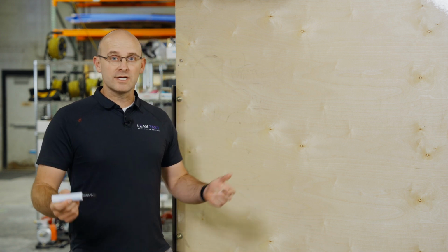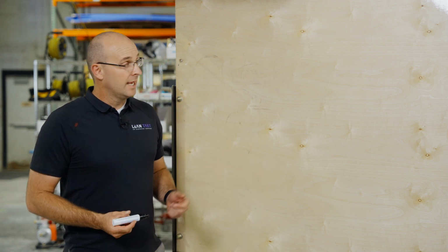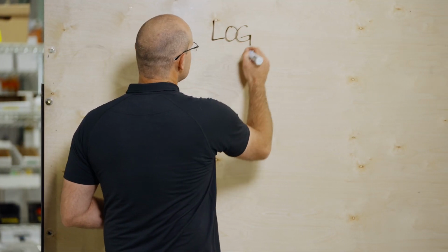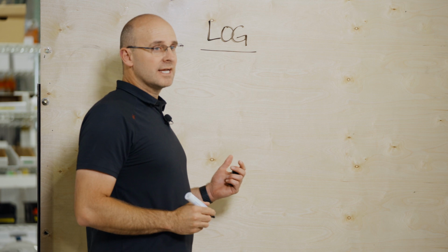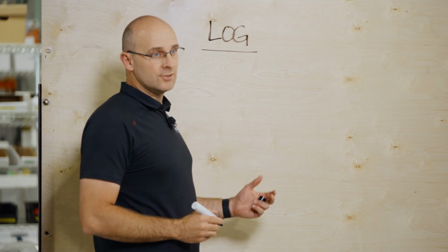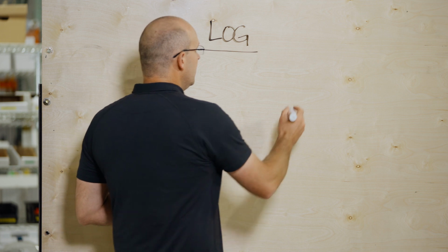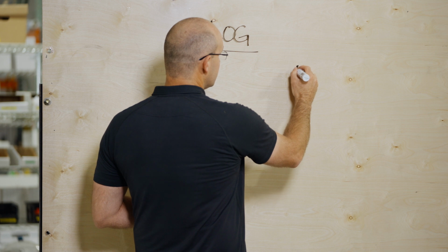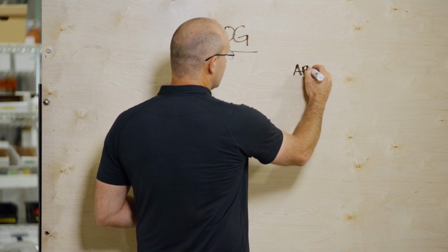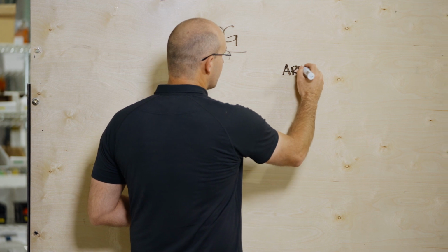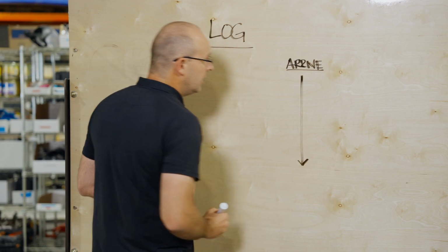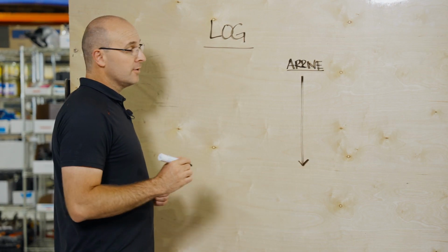So let's go ahead and look at the log if you're going to use a log. And I've chosen to draw this instead of show you an Excel actual template of this. One of these days, our project management systems will manage this like I'm talking about, but I don't know of any that do that today. So first and foremost, the ultimate target is when you want the information or the material procurement, the thing that you're ordering, to arrive on your actual project site. So that column in your log should be filled out accurately from the takt plan.